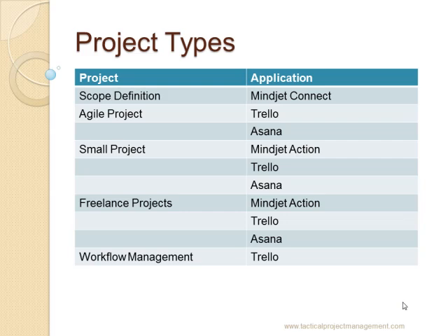What can we use? Anything? Well, in those examples, I would look at both Asana or Trello. Asana allows you to take a project and make it a templated project. I've done that for, say, blog setup for a client, or helping them develop a new website or implement a marketing campaign. I've got my own processes for that consulting, which I set up in a task list within Asana. As I get a new client, I just duplicate that project, assign a new client name, and run through those tasks.